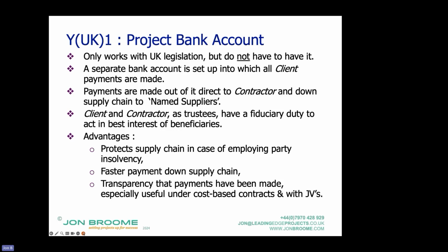And then the other thing is there's transparency that the payments have been made. So let's say I'm a client and I want to have a KPI against faster payments down the supply chain. I can just look in that bank account if I've got access, or I get a report from it, rather than saying, can I have access to your company bank account? Get lost, or getting a filtered report or whatever.